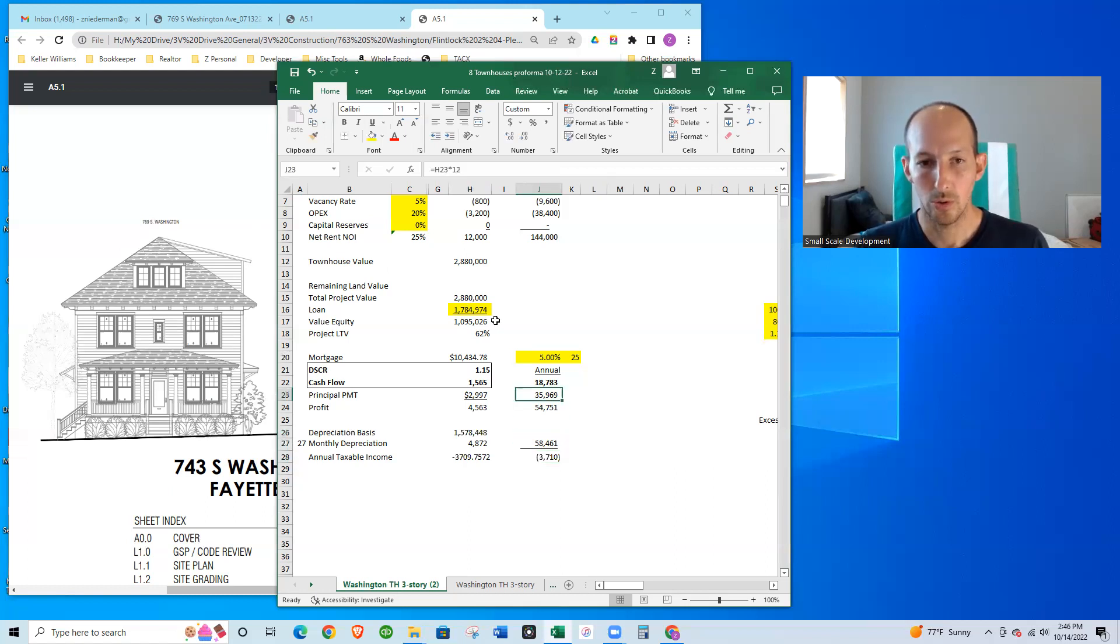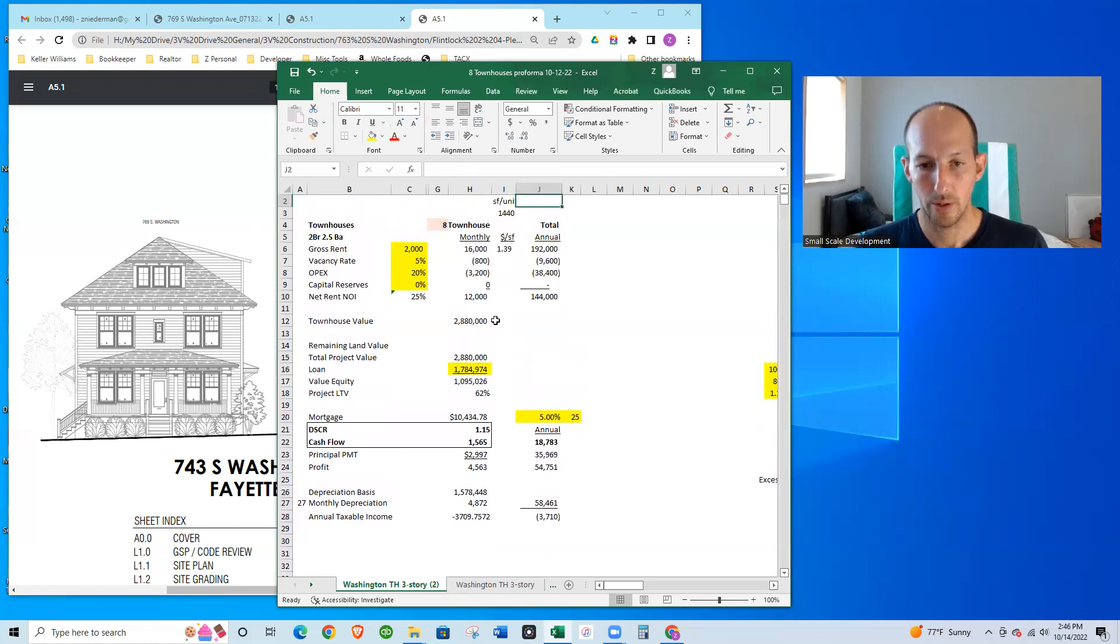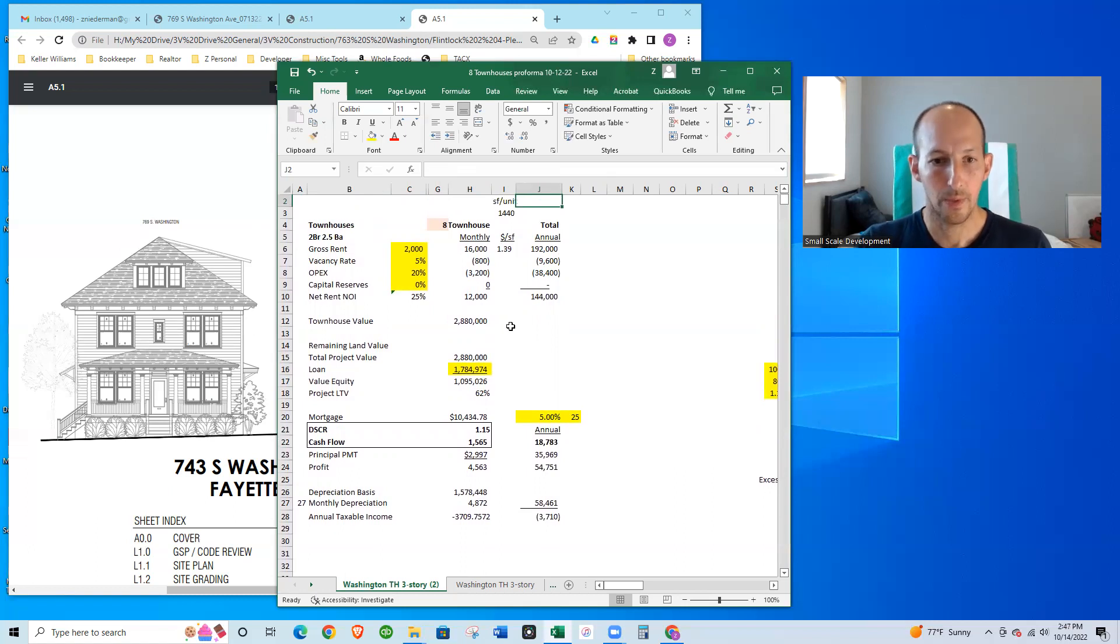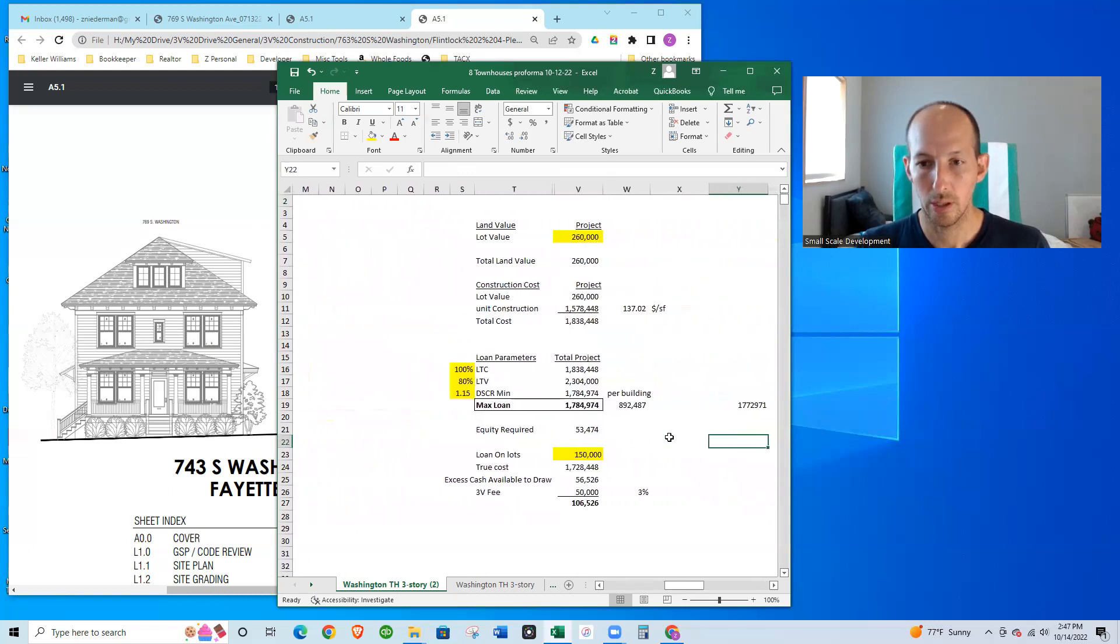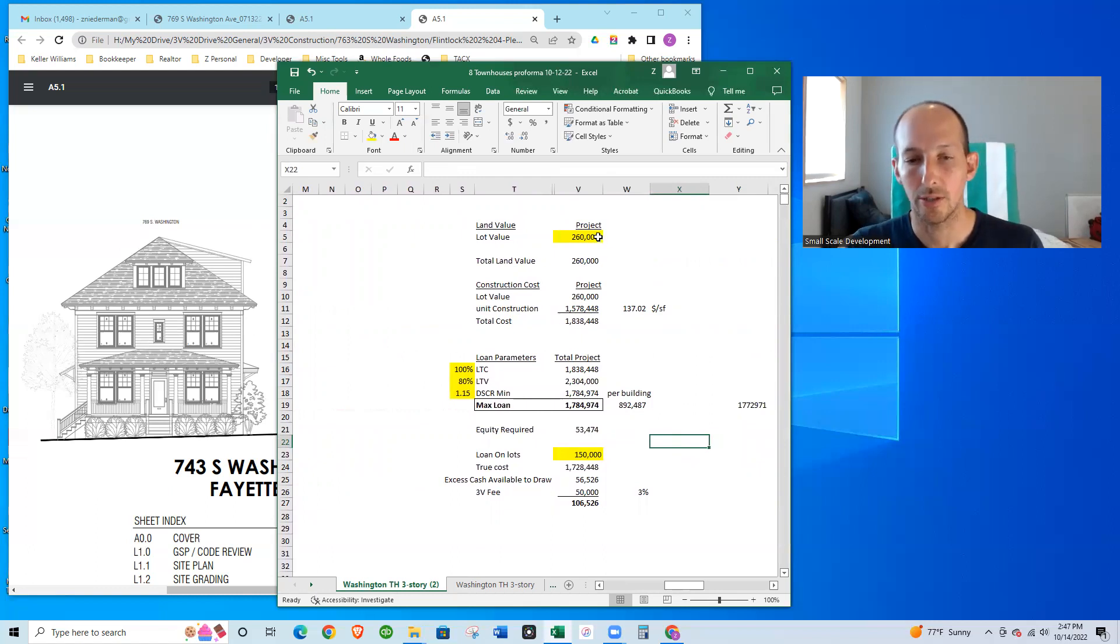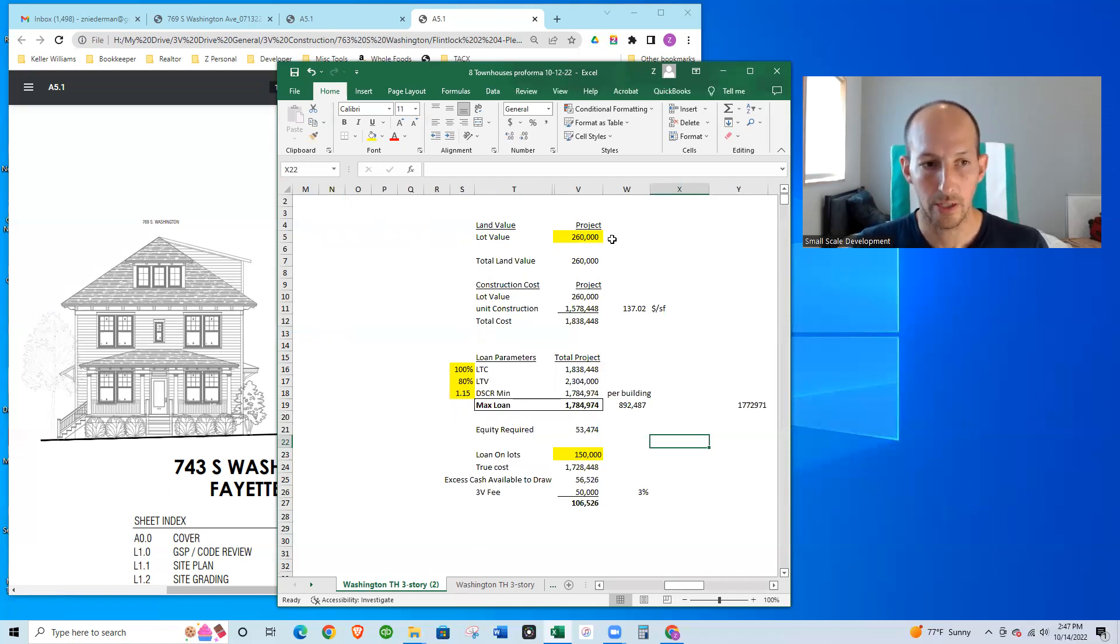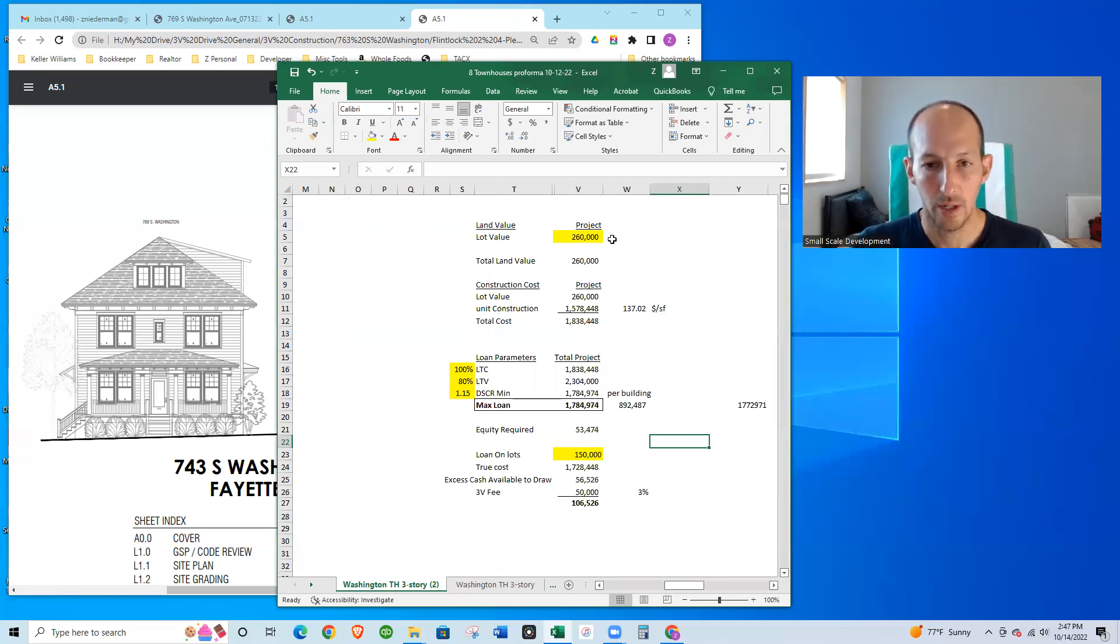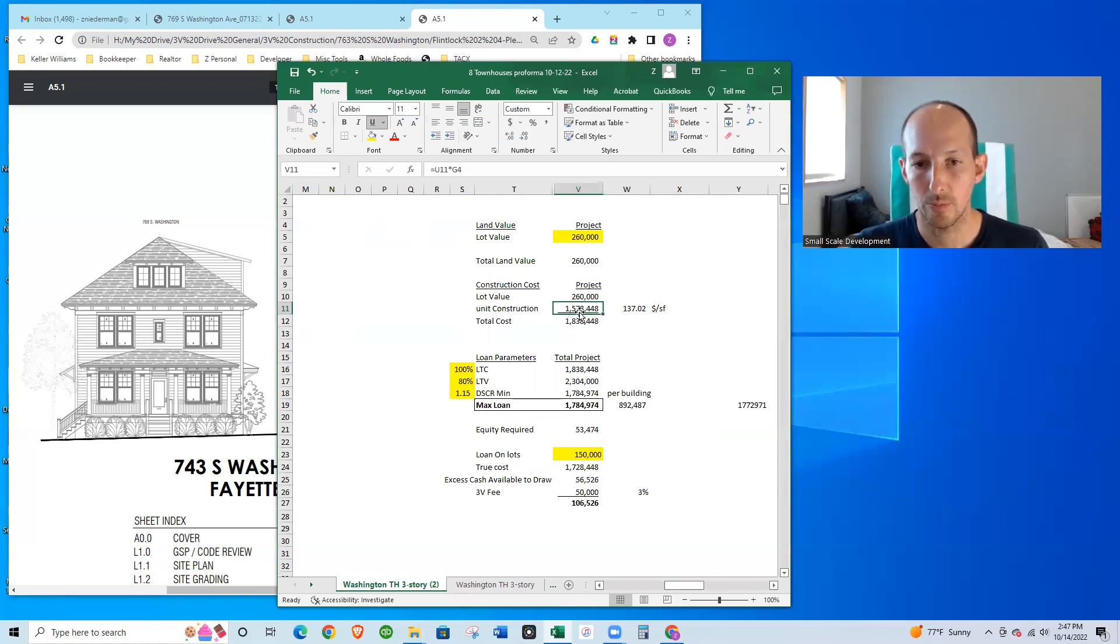So that was how we got kind of an initial look at it. Next let's look at how I got some of those numbers. From the project costs, I'm assuming that the lot value is $260,000. There's two lots here, so each one is estimated to be $130,000 combined for $260,000. And construction costs is $1.5 million essentially. So when you combine the construction plus the land, we're looking at $1.8 million.